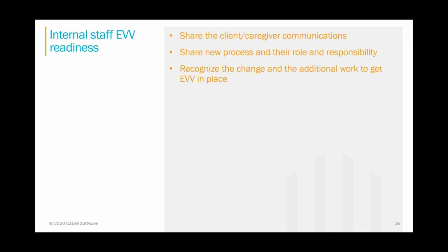It is important to recognize that this is additional work as you're doing an implementation. Once it's up and running, it's going to be less work, but the work changes from what you may do manually to what's automated versus the approvals you have to do. So things change, and there is going to be a workload difference from what you did with paper versus EVV. But people need to know that, and recognizing that there is going to be an uptick in work as you're doing the pilot and trying to do both paper and EVV, knowing that and communicating that with the staff is helpful.